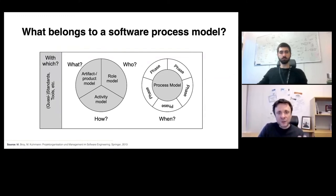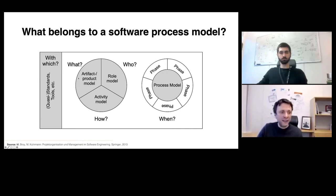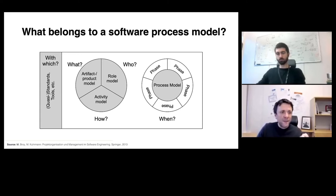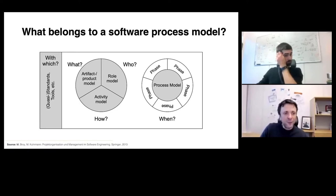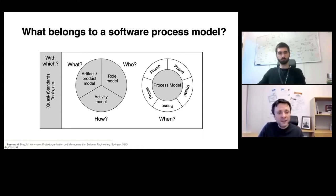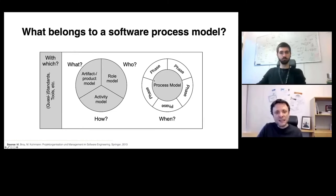The minimum needed to specify a software process model is covered by four essential questions. First: what is in scope — what work products do I need to create, such as a requirements specification, test specification, or architectural design? Second: how to work — covered by an activity model defining the way of working. Third: the role model defining who is responsible for which activity and artifact. Fourth: the when — a temporal order defined by phases and milestones.